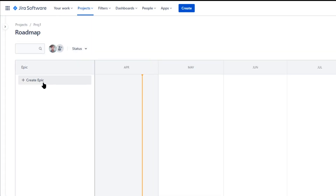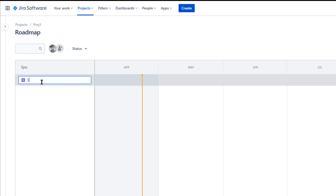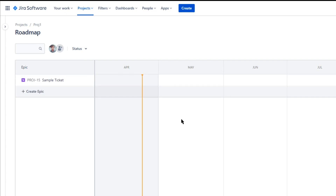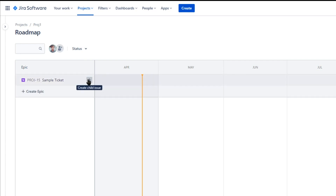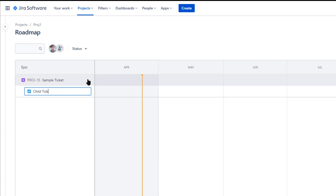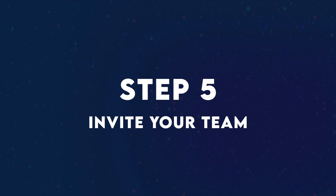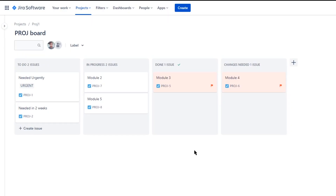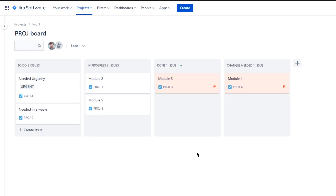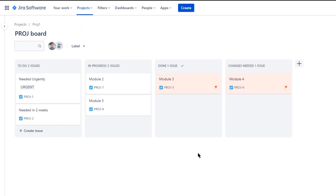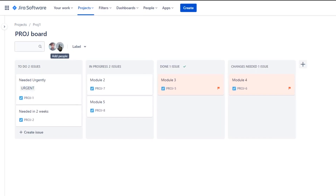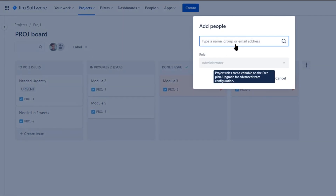This larger project is called an epic. All you have to do is start typing to name it. You can then add smaller pieces of work to the issue — just hover over the epic and click add to add a child issue. The next step after you have everything set up is inviting your team. Navigate to your board or your backlog and at the top of the screen select add people.